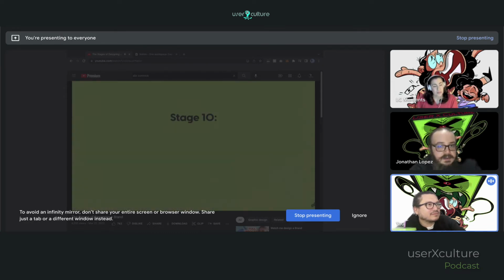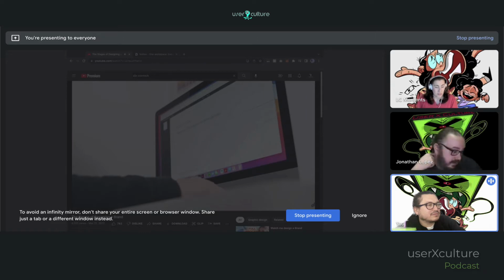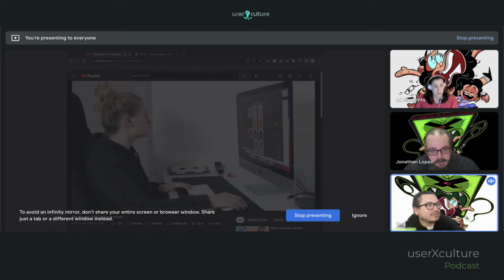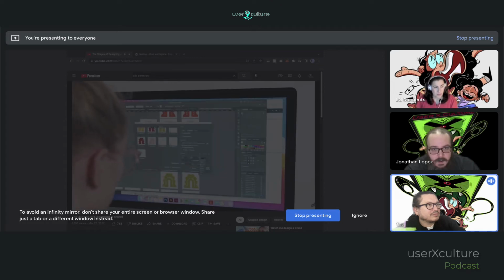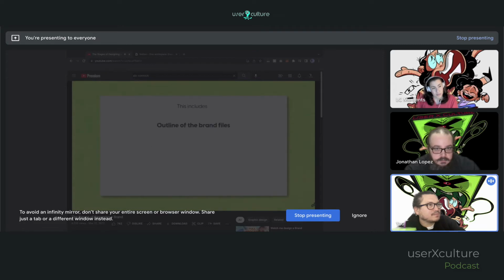Stage 10, offboarding and packaging up files. So the project has now been signed off and the client pays the remaining 50% of the project. Once this is paid, I package up all of the brand files, export their logos, and create a brand guidelines document. The files will then be uploaded to the Notion portal for them to download, along with a goodbye packet. This includes an outline of the brand files, tips and resources, how to leave a review, and if they want to work with me again in the future.